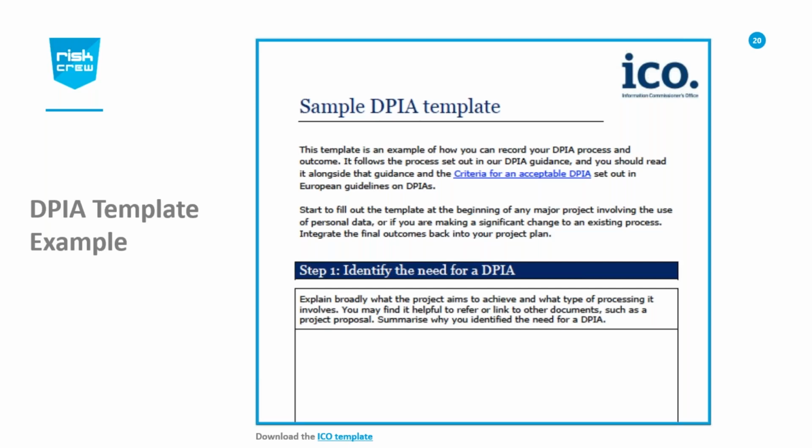Risk levels really are calculated as the product of likelihood and impact. How likely is this risk that you've identified? How likely is the risk going to happen? And what is the impact to the data subject? When those are put into place, you are able to calculate the severity of the risk. That is what's called the probability index table, where you're able to say, okay, what is the likelihood or probability of that happening and the impact. That is how a risk level is actually calculated.